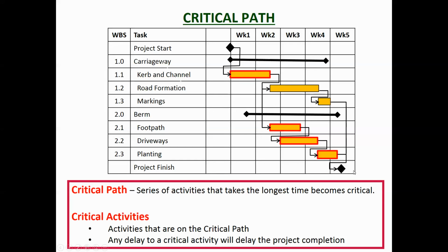Now if you're looking for what to focus your management on, it is these critical activities, to make sure that they come in on time, that they have the resources to do it. Now that doesn't mean that you ignore these other activities, because if this one went on for a week over time, then all of a sudden this non-critical activity becomes a critical activity. So the critical path is not set in stone. It can change as the project progresses.